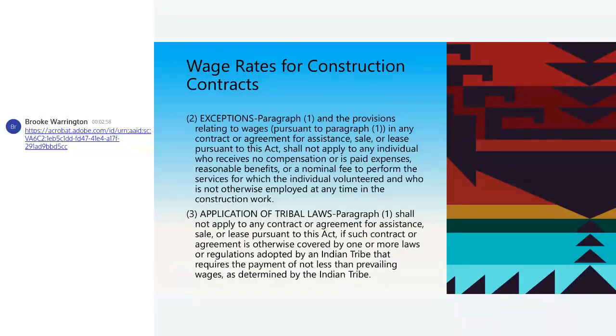Very, very few. You might have a contractor try to tell you that they're using an apprentice, and the apprentice therefore does not need to receive Davis-Bacon. Well, it goes a little further than that. If it's an apprentice, it has to be an apprentice under a Department of Labor approved training. So when in doubt, you can always call the Department of Labor. They are happy to give you training. You have to be careful there.